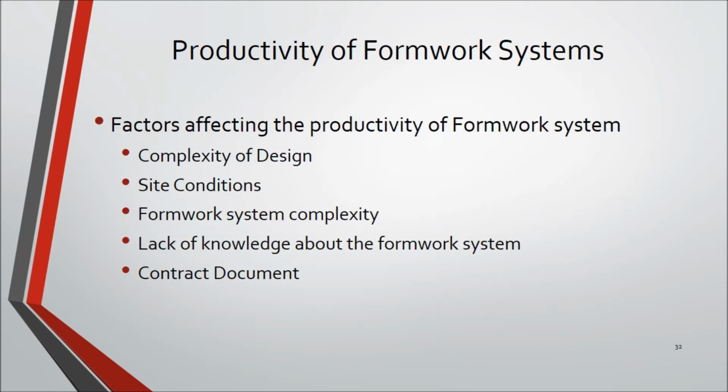The following are the factors that affect the productivity of the formwork system. Design complexity will dictate all aspects that will increase or decrease the time required to fabricate, erect, and dismantle the form on site. Factors like area available for materials storage, planning and sequential arrangement of formwork operations may increase or decrease the productivity at the work site.